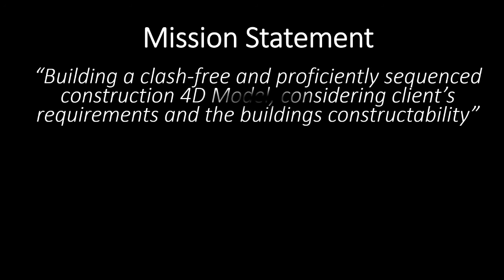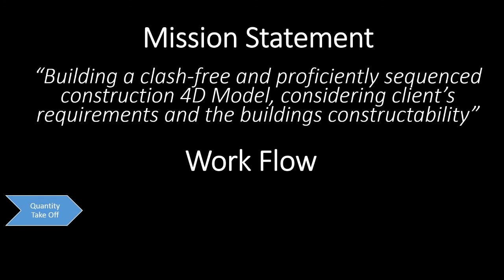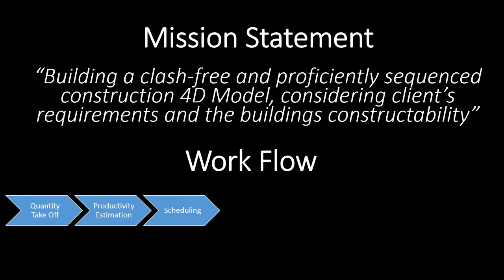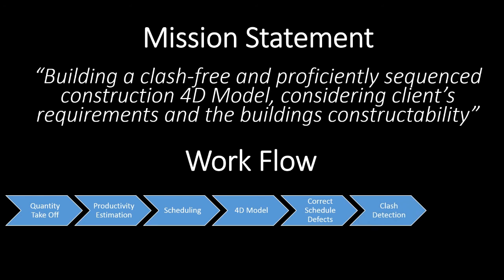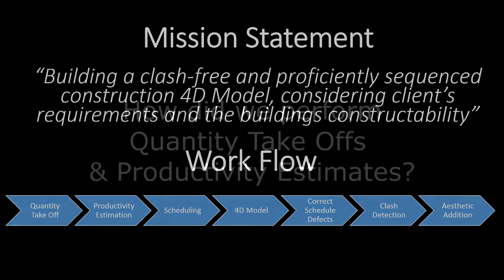Our mission statement for this project is to build a clash-free and proficiently sequenced construction 4D model considering client requirements and the building's constructability. Our workflow for this project has the following sequence: quantity takeoffs, productivity estimation, scheduling, 4D modeling, correcting schedule effects, clash detection, and aesthetically improving the model.